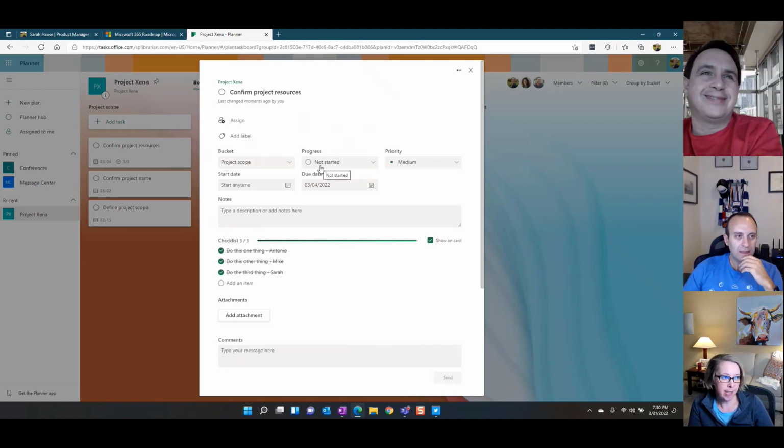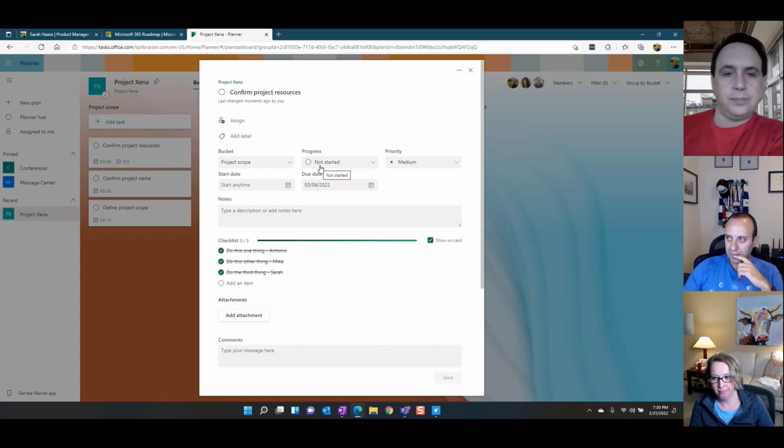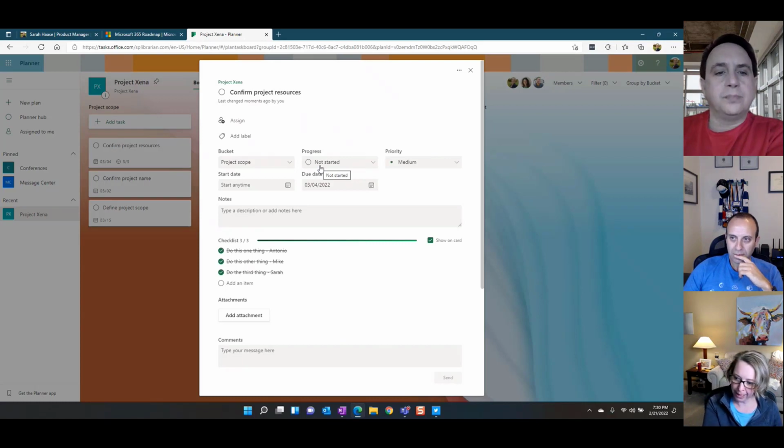I know for me, if I'm facilitating project stand-up meetings that have a planner plan, I am diligent with saying that I want only one person assigned as the owner of the task, because that's the person who's held accountable for the task being done. And if, Mike, you need to consult with Antonio or inform others about something related to the task, ultimately, you're the one who needs to come out and do the stuff and mark it off as complete. Yeah.